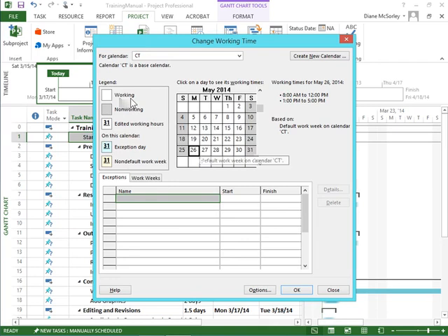According to Project anyway. If we want an actual projected end date, we should tell it about the days off so that it doesn't schedule anyone to work that day. And once we change the schedule, you'll see that we do get some different colors that pop in to let us know that the days are scheduled as different.